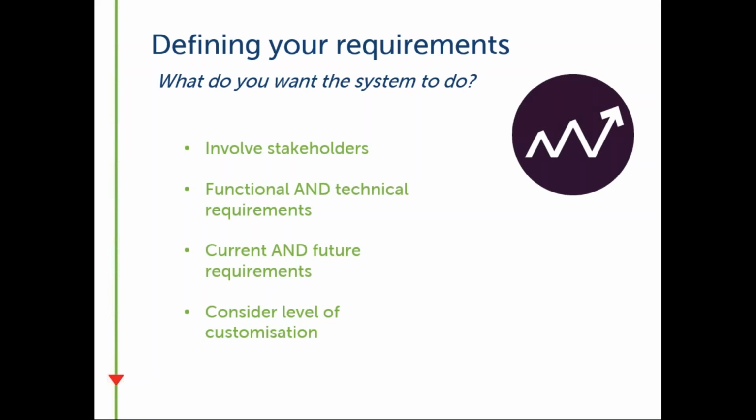The way we encourage our clients to go about this process is to produce a requirement specification. This is just a simple Word document, and then we ask the various vendors to respond to this. So this can be split into both functional but also technical requirements. So some quick examples then of the functional requirements. We've got data collection and requirements that fall under that, reporting and dashboards, the data verification, how that might look within the system, and of course a more general one, data management.